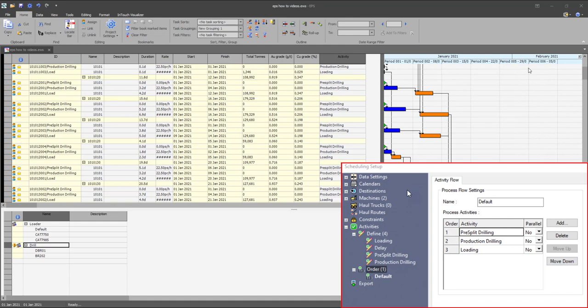The order defined in the process flow on Studio OP is enforced by dependencies between the tasks representing the blocks.